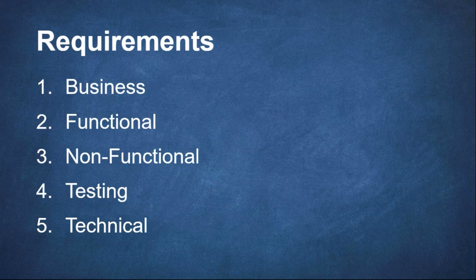So a business requirement. One example of a business requirement is, let's say, reduce the amount of time it takes for prospects to become opportunities. The functional requirement of that would be, let's say, centralizing prospects on a hub site, or giving the sales team forms. Non-functional requirements are requirements that don't necessarily add any value. So those are requirements like policies, stuff that you have to comply with.